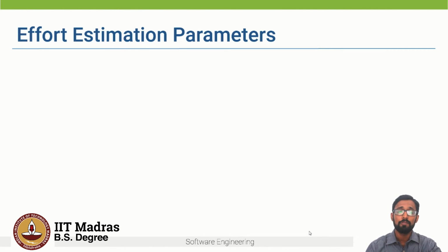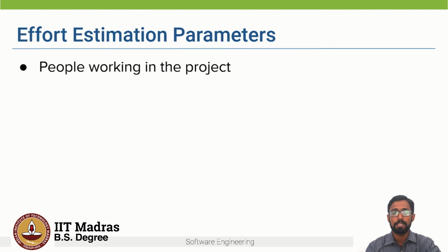Okay, so apart from the size of the project, what other factors have to be considered? Let's look at that. Some of you might have said the people working in the project, right? Some team members may be experienced, but not in the programming framework required for this project. Others may not have domain experience. So in the case of the Amazon seller portal, how an e-commerce application works, and hence some time will go in learning about the domain.